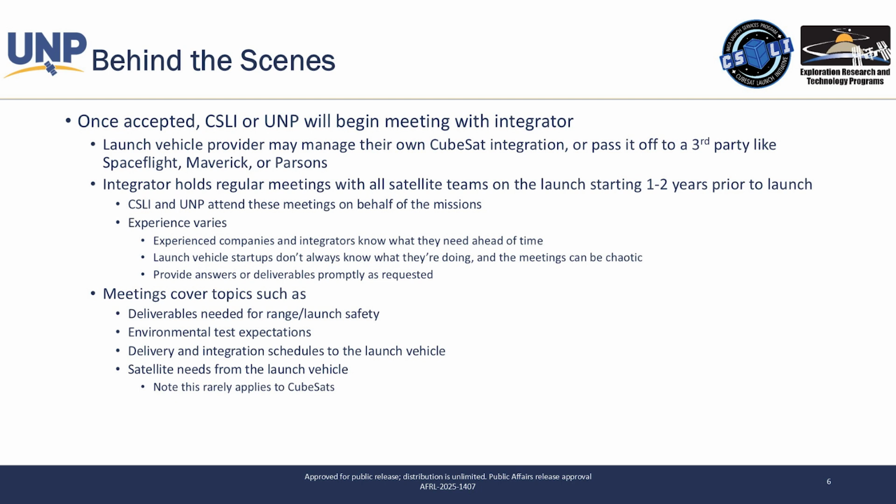So when something's asked of you in these meetings, make sure you provide the deliverables as promptly as requested, because if they're asking you for input, it's because possibly they need that information to clear something with the range or clear something with their own safety process. So any delay in any deliverables being asked of you directly impacts their launch schedule and impacts your ability to make that launch.